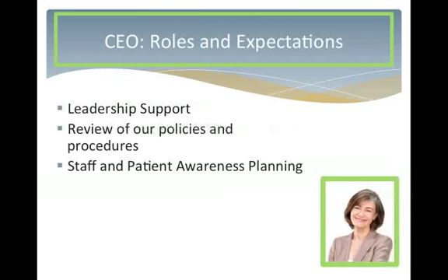At our all-staff meeting, I shared the goals and the vision of our Certified Complete EHR, and I provided regular updates to the staff. We created flyers informing patients about the EHR and posted them throughout the health center. We even put together a campaign that counted down our go-live date. We had to determine the impact on access and make plans to accommodate patient volume as we reduced our schedules to allow the users time to learn the new system.